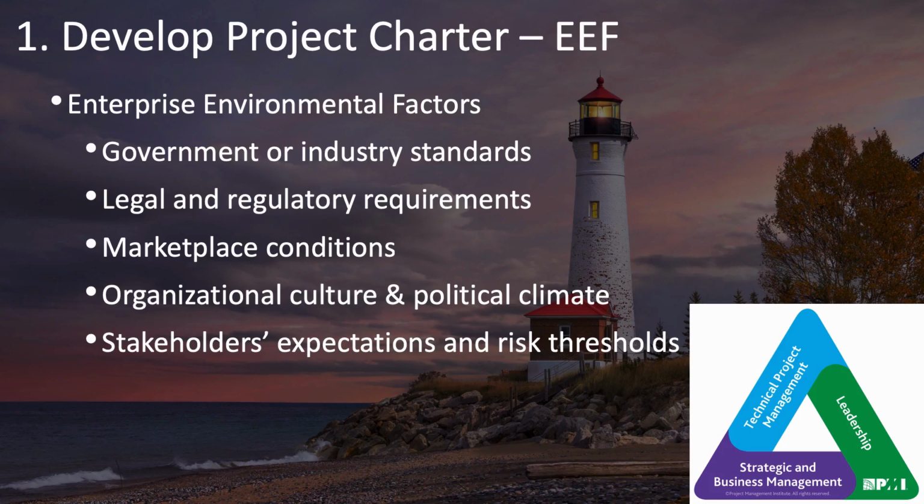In some states, you cannot do any work on a project or use any data outside of that state if you're on a project for that state government. There are also standards and requirements and regulations regarding environmental impact, food safety, and even ADA Section 508 compliance, which is about making your software accessible for those with disabilities. So you can see there are quite a number of government and industry and other legal and regulatory requirements that you need to consider as inputs when you're putting together your project charter.